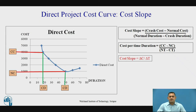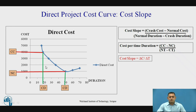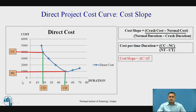This is the particular direct cost curve. As explained earlier, in the initial stage the direct cost of the project is at a higher level. As time passes, the direct cost reduces. It reduces to a certain level, but if we delay the project its cost increases. Here you can observe the particular points: normal cost, normal duration, crash cost, and crash duration marked on the curve.